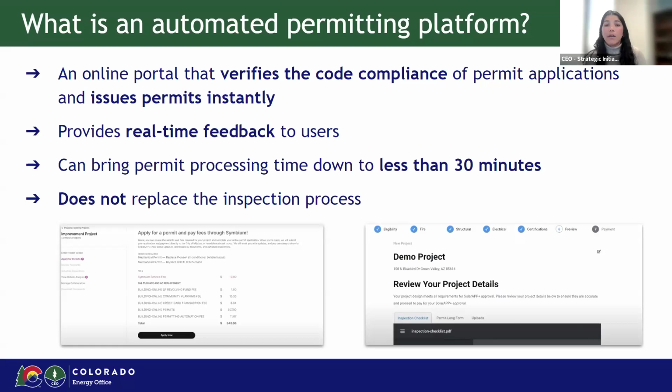One important thing to note is these platforms are not replacing the inspections process. So that is going to stay exactly the same. These platforms are really just streamlining the permitting stage of the solar process. So an installer would receive a permit, install the system, and then they'd still need to call and schedule that inspection the same way as they typically would.